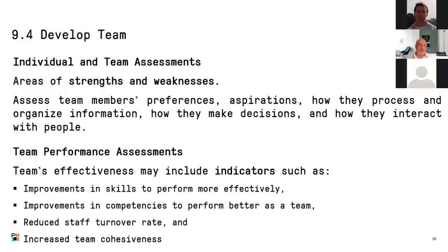utilize our team. One of the terms that some will not be familiar with is the turnover rate. Turnover rate is the number of people who are leaving the project, not on the due date of leaving the project. What does this mean? Let's say I have a team of 5, and after 3 months, I need to reduce this team from 5 to 3. So I will need to tell 2 of my team members, thank you very much, you are back to the organization, you are not working in this project anymore. This is not a turnover, because this is a planned let go or returning resources to the main organization.